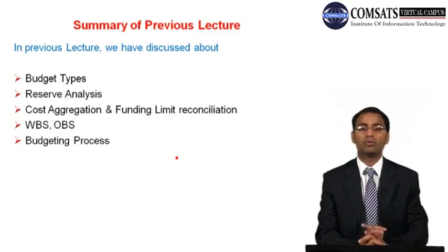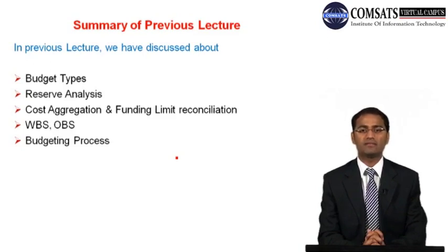Then we talked about how, for contingency reserve analysis, we analyze the event or risk which can happen, and we then evaluate how much cost may be needed to mitigate that risk.